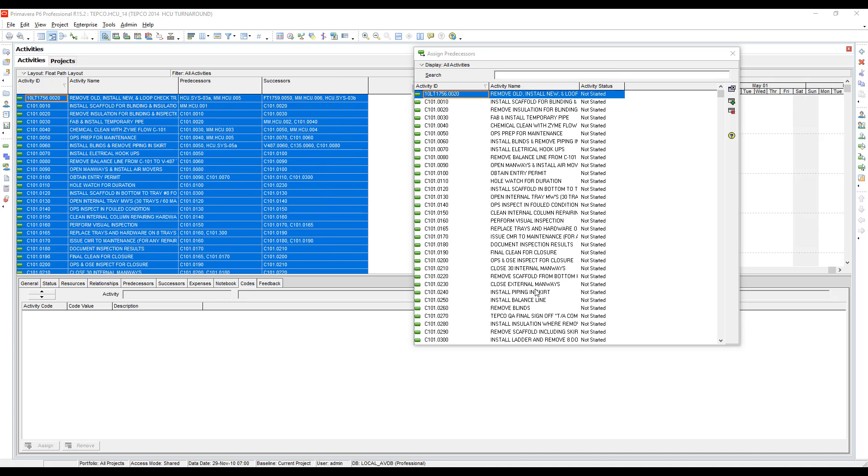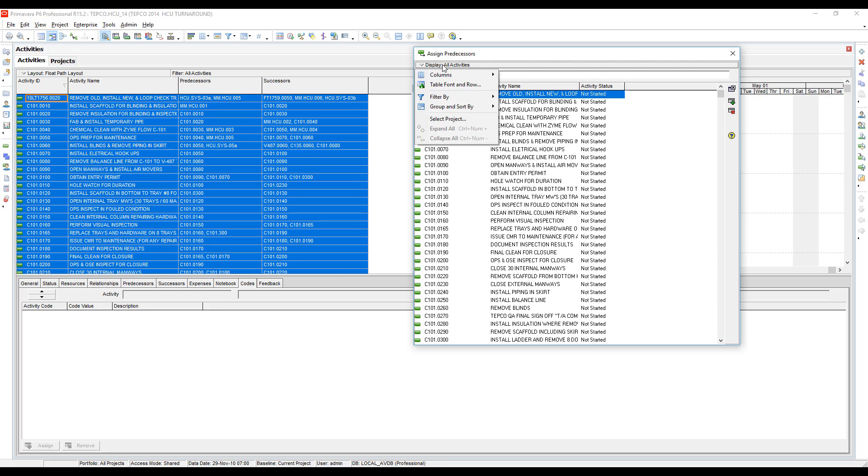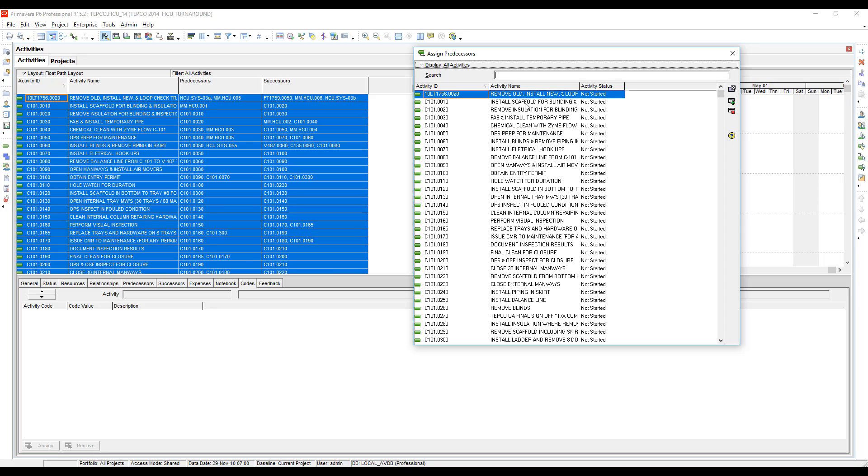And by the way, it seems to be a good idea to have your relationship lines turned off. For some reason, I feel like there's a lack of performance or it doesn't move as quickly if the relationship lines are on, because actually when the relationships get removed, the screen has to redraw so that the relationship lines are removed. So anything you can do to speed this up is a good idea. But when I do get the predecessors window open, I do like to go to the display drop-down and take the group and sort by and change that to a list. I've also noticed that without having the grouping on there by WBS and so forth, that can seem to speed things up as well.